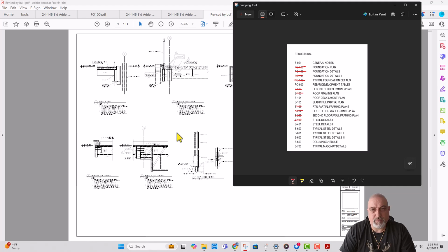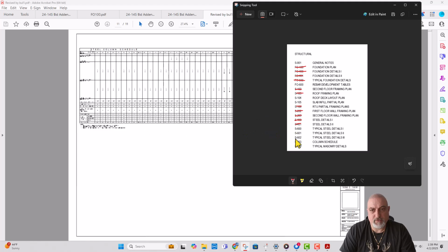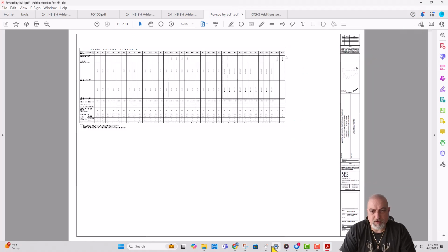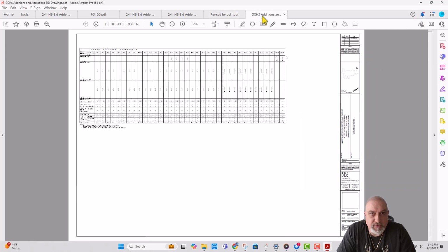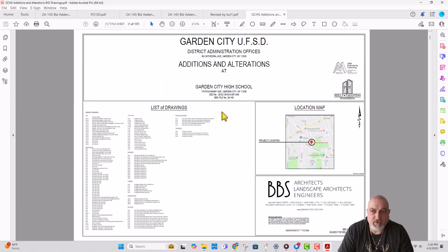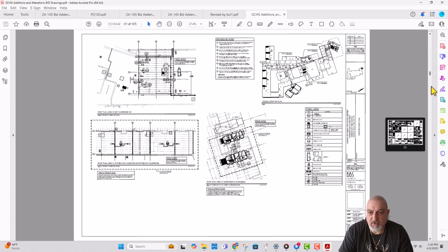That's 400, 401, 603. Come on, 603, that's the latest one. Okay, so we know this was addendum 3 and the others were addendum 1 revisions. And I need to take out these drawings from the original document, which was this, to be able to make one complete set with the latest revisions.